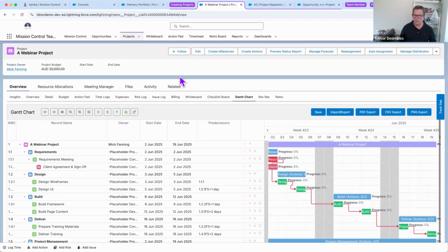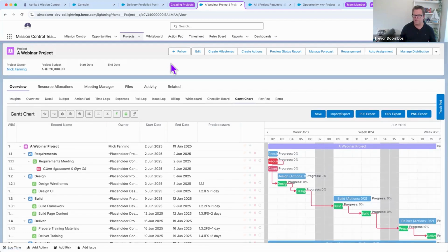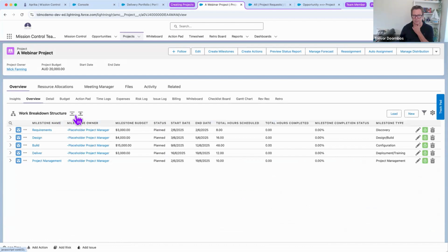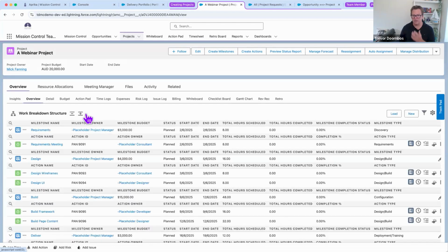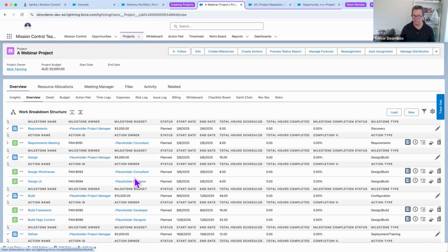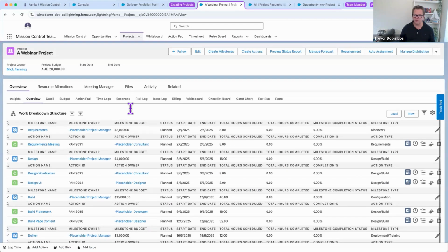And then I might actually say for this webinar project, I don't just want to have this as a new project. I want to create this as a template. And that's one of the questions I get asked a lot: how do I make a project a template? Well, this is a good candidate for a template because I haven't got real names in here. I've got placeholder roles. I've got a lot of the information in here. I've got the hours, start dates, what have you.